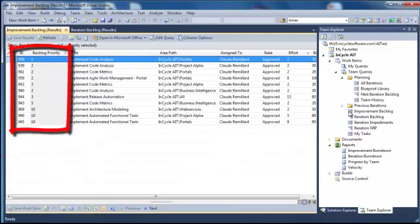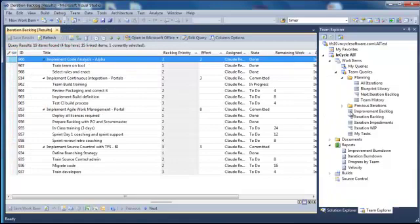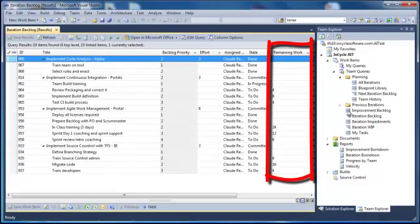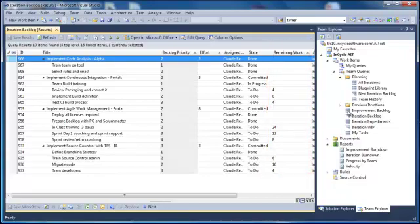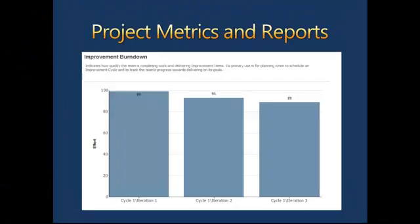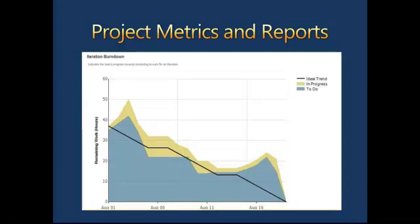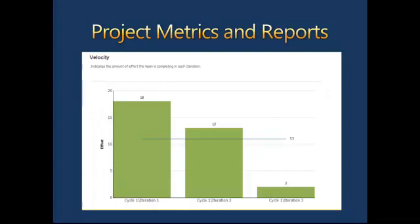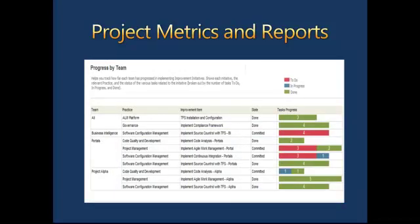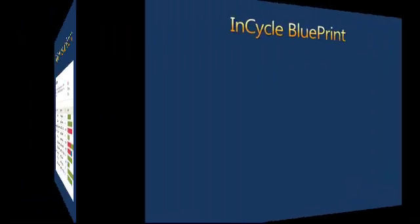The result is an improvement backlog that you can use to prioritize improvement opportunities. Once it has been established, you'll plan for your next improvement iteration — usually every four to eight weeks — by assigning improvement items to the next iteration. At the start of an iteration, these items are broken down at the task level. During the iteration, teams update work remaining as they perform the work. Project advancements can be tracked through common Agile reports: an improvement burndown showing how quickly the team is completing work, an iteration burndown illustrating progress in the current sprint, team velocity indicating improvement value delivered per iteration, and progress by team tracking each team's advancement.